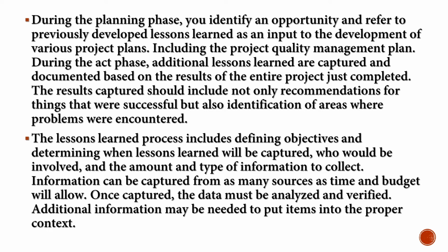So the lessons learned process includes defining objectives and determining when lessons learned will be captured, who would be involved, and the amount and type of information to collect. Information should be captured from as many sources as time and budget will allow. Once captured, the data must be analyzed and verified. Additional information may be needed to put items into proper context.